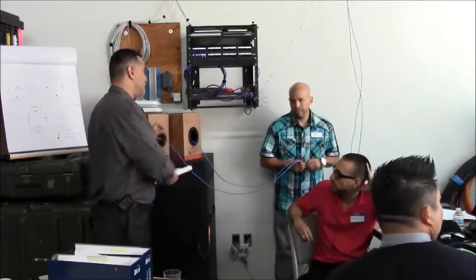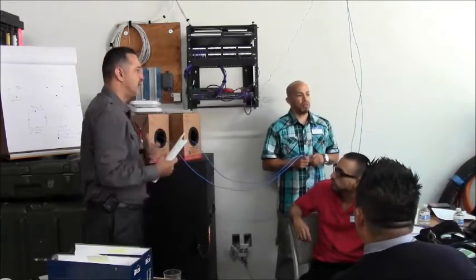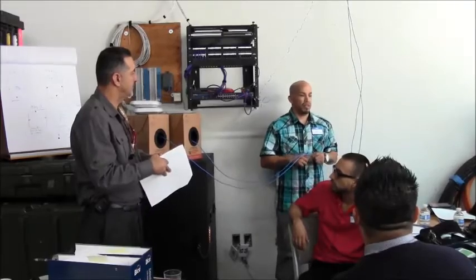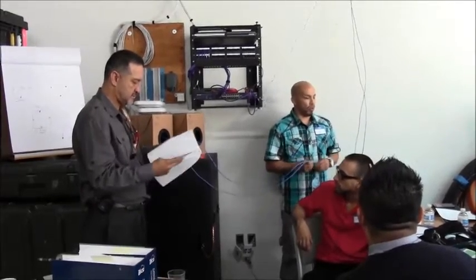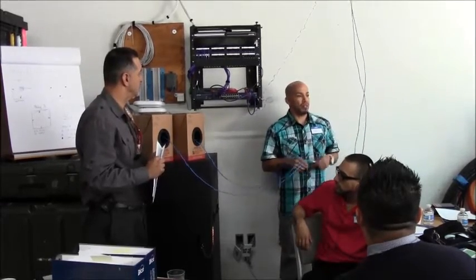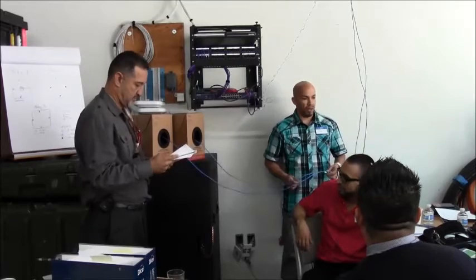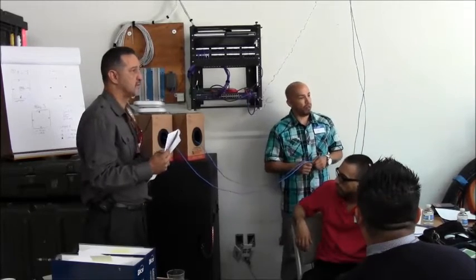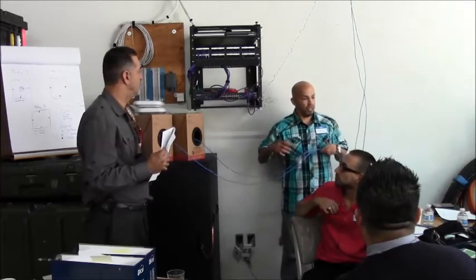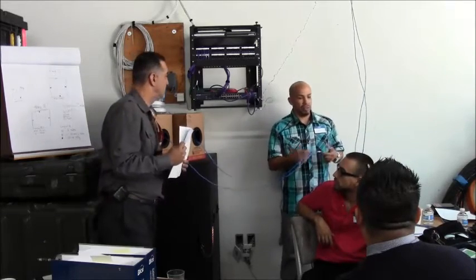Especially if they're pulling and you're just feeding them the cable. Sometimes you'll get customers that have their own pre-labels too. They'll give you the scope of work and the prints, and with the prints come labels. They make up these big sheets of labels. They'll have one for pulling, and then after you're done pulling, one for the final, which is terminating. So it's the same thing.